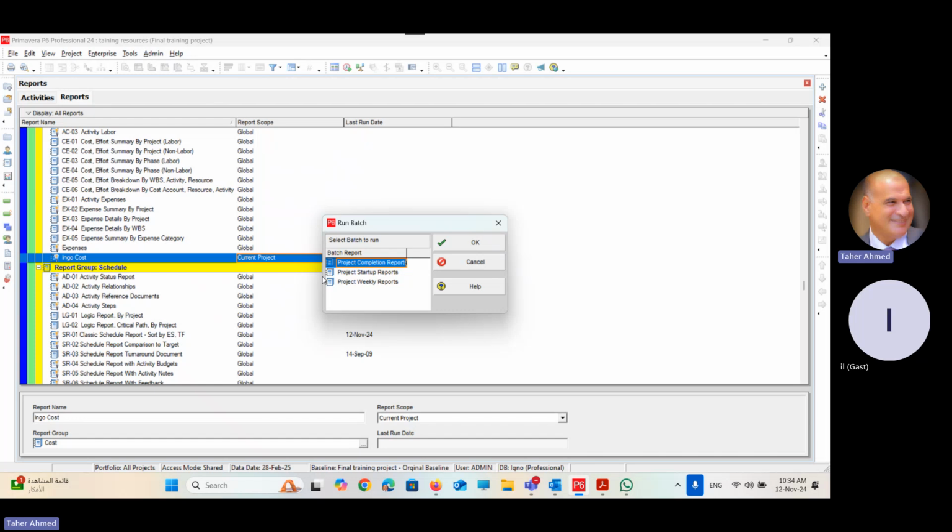More than that, we can use it as an alarm. I can set it automatic. Every Friday at 2 p.m., run those 4 reports which are included in my batch, and send them directly to my boss. So how to create a batch? It's a good job, by the way. How to create one instead of run?